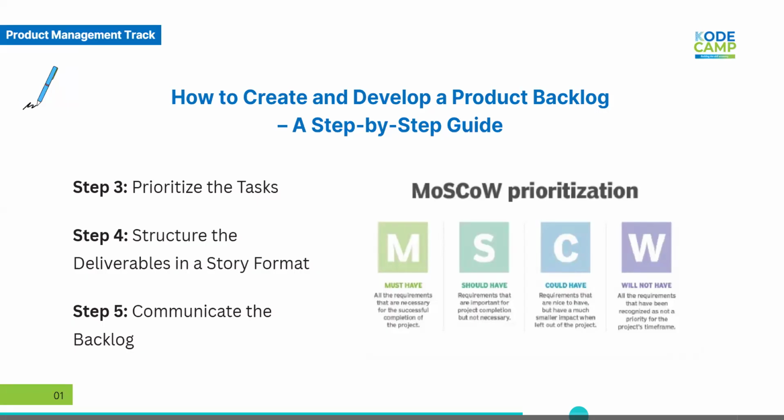Now, backlog refinement is very important and very integral to keeping your team aligned. I always recommend holding regular refinement sessions, weekly or bi-weekly, whatever suits the rhythm of your team. But you just have to hold it, right? During these sessions, you walk through the upcoming stories, you explain the why, answer the questions, split the big items into smaller chunks, remove outdated ideas, and update any missing context.